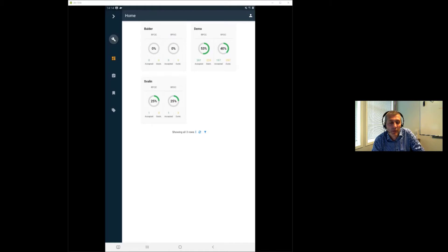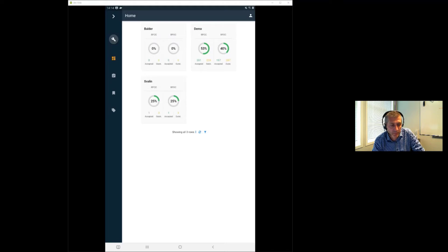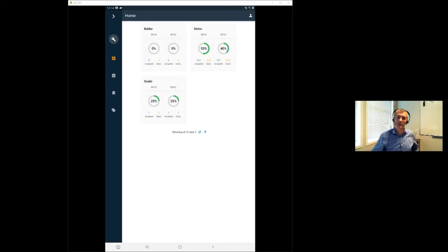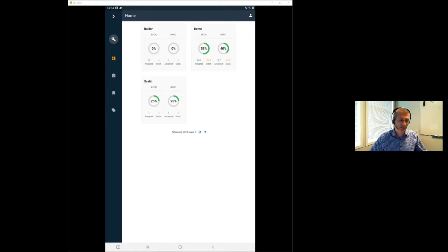Another key part of the field application is what we call punch items or the punch list — these are deficiencies. If equipment is damaged or not installed properly, it gets added as a punch item. Category A punch items are critical items; category B are non-critical. These two parts — punch items and checklists — are the integral part of both the field inspection application and the whole PIMS completion application.